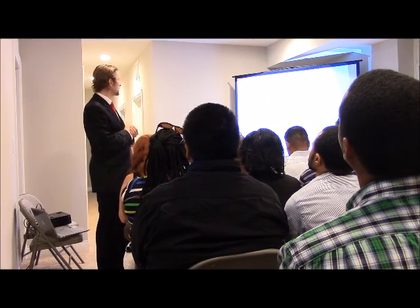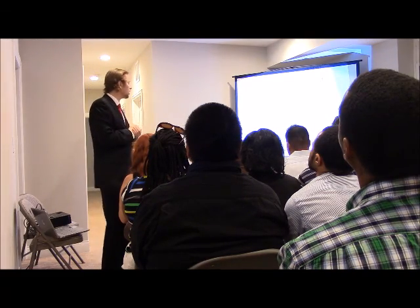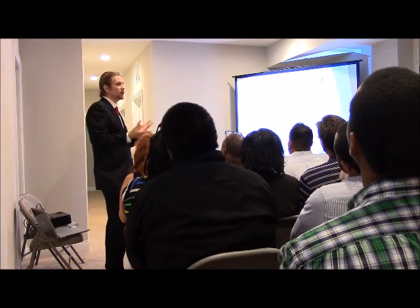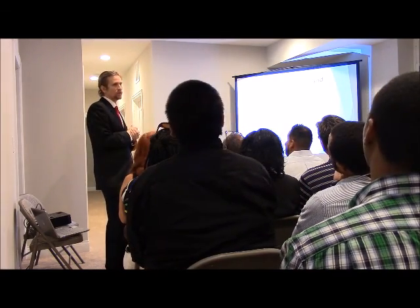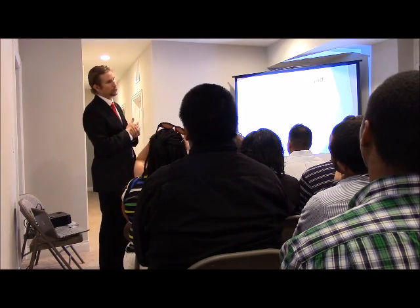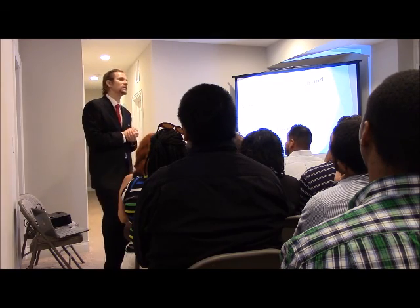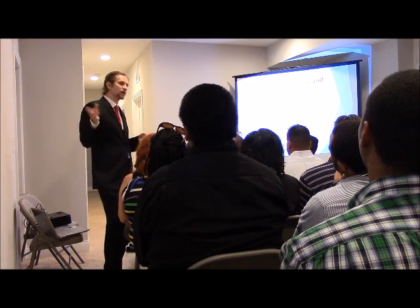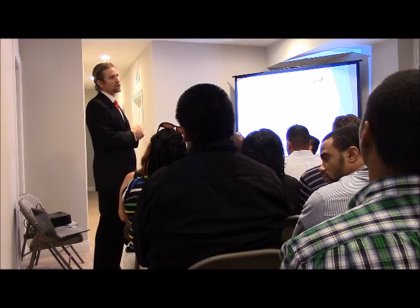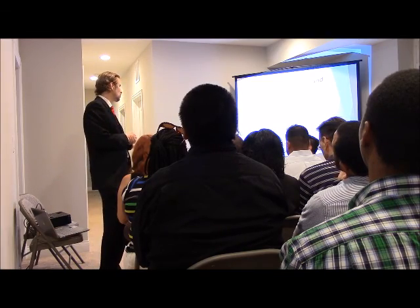So we're doing the insulation, hanging the drywall, mudding and sanding the drywall. Again, another thing you want to consider is having a temperature controlled environment to do that, because if you're doing mudding and you've got a lot of humidity in the house, it's going to take a long time for the mud to dry. Then you've got to run heaters and that sort of thing. So having a climate controlled property as quickly as possible is important.